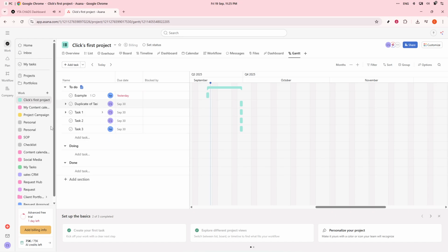Finally, track your progress efficiently by using milestones. These diamond icons are perfect for marking key deadlines and give an immediate visual cue of your project's progress. A quick scan of your chart will help you spot overlaps or delays and monitor dependencies so you're prepared for any impact that a delay might have on your interconnected tasks.